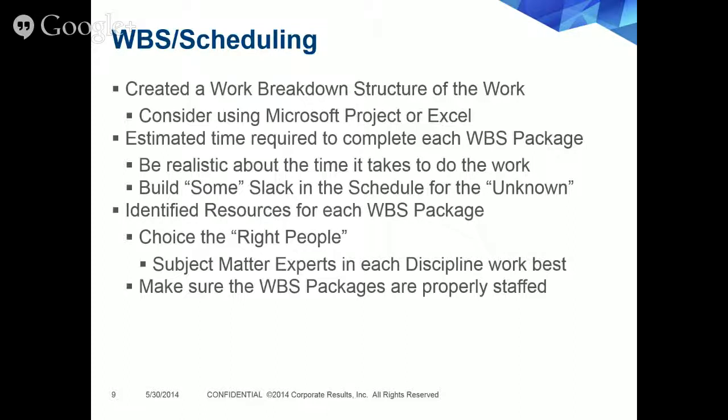After you develop the WBS, one of the key components is the estimation of completion for each package. You need to be realistic in the time it takes to do one item, and also within that, the resources that are needed for that one task or one item. You need to be flexible with what you have assigned and who you have assigned. And along the same lines, there needs to be some slack in the schedule for the unknown elements that arise, and they typically take time to solve.